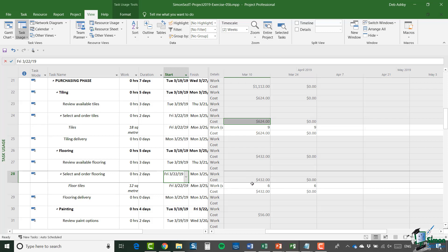One point to notice here which can be quite confusing: because we've assigned the floor tiles resource to the Select and Order Flooring task, Project assumes that we're actually going to consume this resource on this task, even though what we're actually doing is paying for it on this task. There are a couple of other ways to deal with that which we'll look at later. It's important to realize that some of the assumptions Project 2019 makes when you assign a resource to a task are not necessarily how things are in reality — but if the cost works out fine showing the cost when you buy the tiles, even though you're not using them in that buying task, that approach is acceptable.